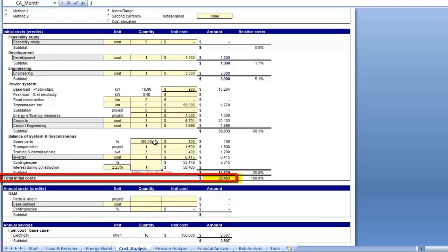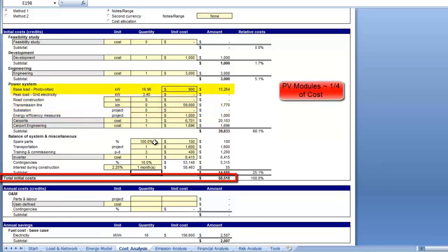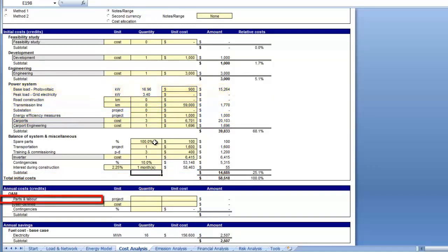Overall, given the cost analysis, we get a total cost of $58,518, which corresponds to $3.45 per peak watt. This is cheaper than the initial estimate, which may be attributable to significantly cheaper panel prices than those accounted for in our initial estimate. The carport comes as the most significant cost category, making up around 1/3 of costs, and the modules represent close to 1/4 of the project costs.